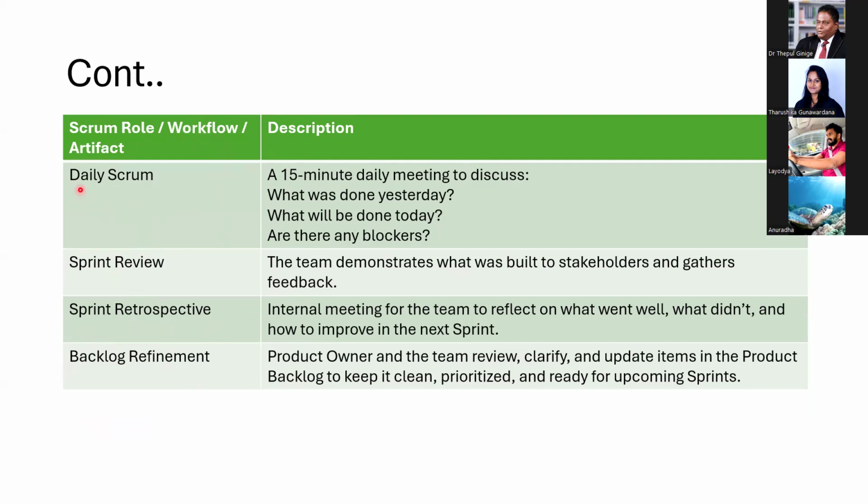Another important thing is the daily scrum, where we discuss what I have done yesterday, what I'm going to do today, and whether there are any blockers. That particular meeting should normally be a very short meeting, like 15 minutes, right? It should not be a lengthy meeting.